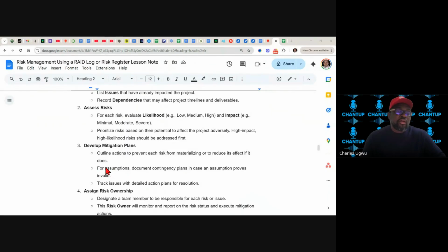I've already captured it here as contingency plan. You see it here as I'm pointing at it. It's called contingency. Contingency is not only on the budget. Contingency can equally be applied to your timeline. If you have 6 months to implement a CRM system, customer relationship management system, don't plan on 6 months. Plan to implement it within 4 months. That is another contingency plan.